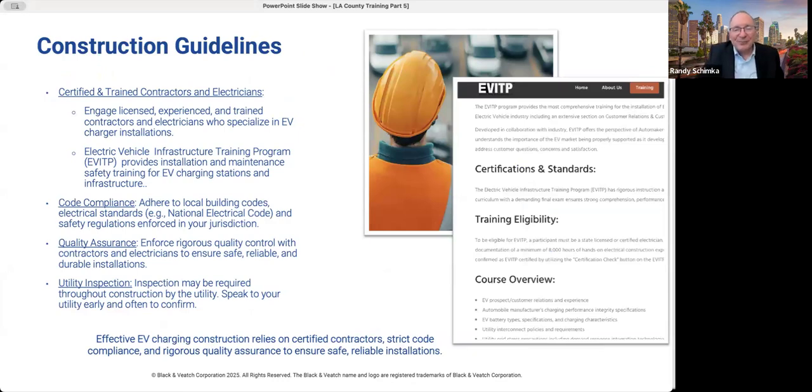All right, very good. Thanks, April. We've talked about this a little bit in some of our previous webinars, so I've got some best practices, kind of a summary for construction that will help make your EV charging station project a success. It's very important to hire certified contractors that employ trained and certified electricians, and they need to have direct and relevant experience with installing and maintaining EV charging stations. The Electric Vehicle Infrastructure Training Program provides inexpensive safety training for the installation and maintenance of EV charging stations and associated infrastructure, and it's actually a requirement for many projects that receive state or ratepayer incentives.